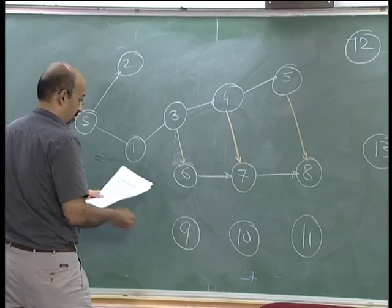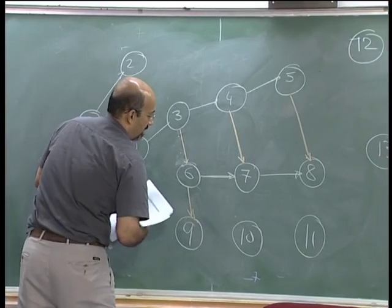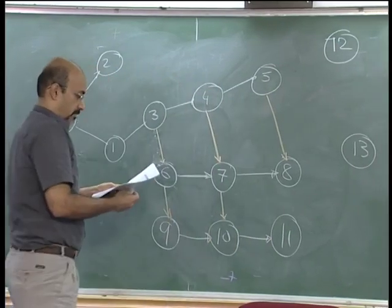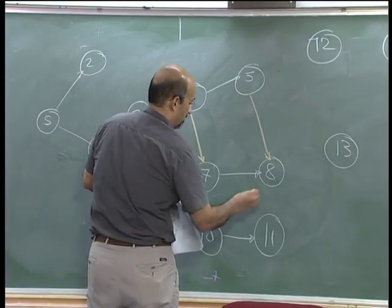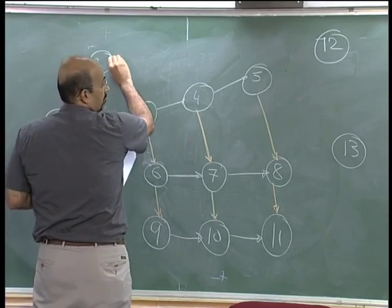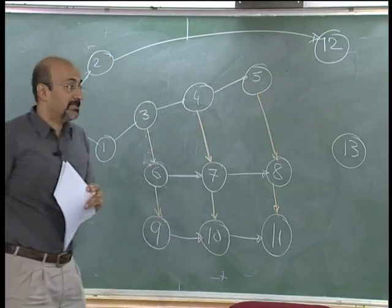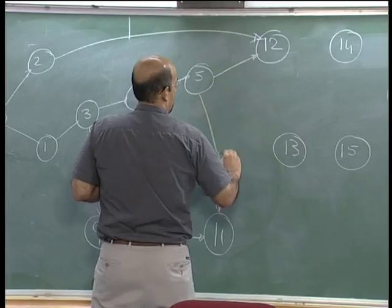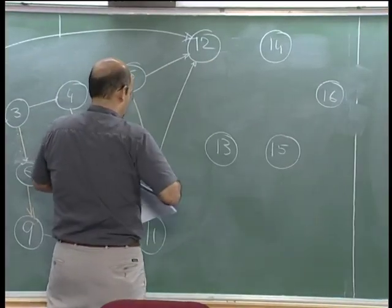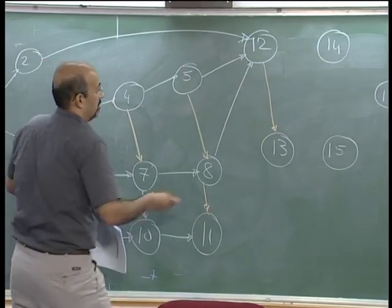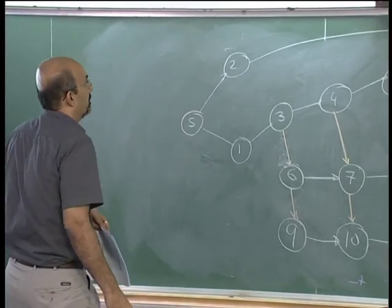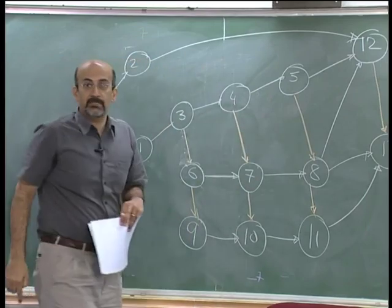Now, my relationship between 6 and 9 is also resource. 9 and 10 is the physical. So 11, then this is up to the abutment again 8 and 11 is the resource driven. My 2 and 12, this is the place beam on the east side. It requires 5 and 8. The crane that is going to be used there will be released and then, only then I will be able to do 13 which is placed on the west side which is now 8 and 11.